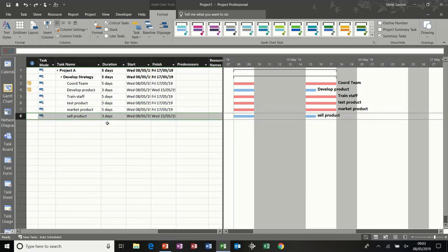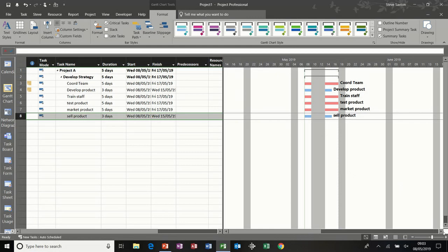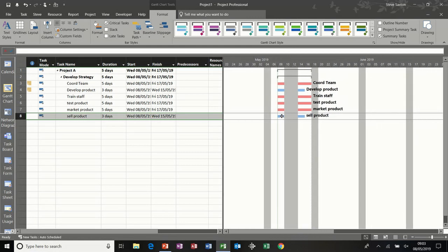Now on the Gantt chart itself, you can actually move tasks. So I'm just going to come down a little bit on there so you can see this better. If I sit my mouse on this task, I can push that forward and move it into next week. Now that's gone red now because that is the only critical task. There's a gap there, so it's showing red. I'll just take that critical off for a minute. Now when I've done that, it's the same as me changing this day manually, so we get the same thing coming up in the information column, a little moderate constraint.